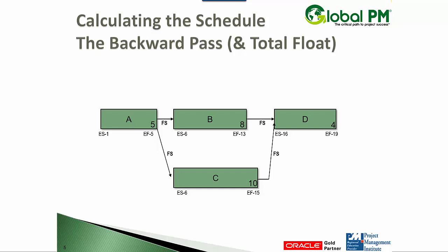Let's start with D. If we're shooting for day 19, the latest it can finish is day 19. The latest it can start would be day 16. And the formula, just so you'll know, is late finish minus the duration plus one gives you the late start. So 19 minus four plus one is 16.